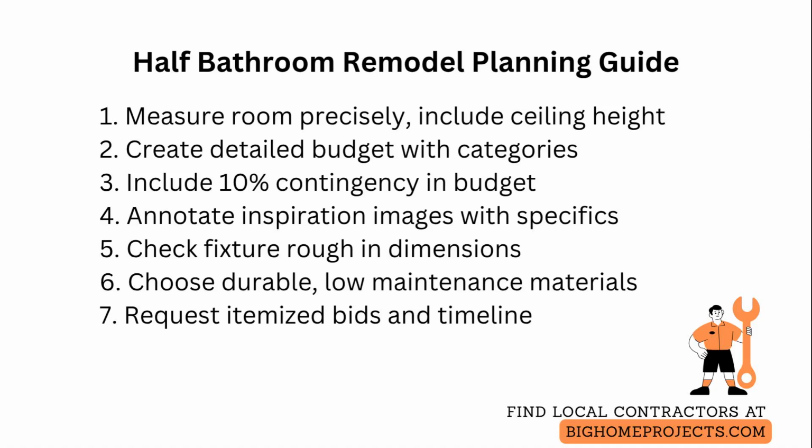Choose materials by lifespan and maintenance rather than just initial cost. For example, porcelain tile and solid surface counters last longer and are easier to maintain than cheaper alternatives. If you will hire contractors, ask for itemized bids and a timeline. Verify where payments fall in the schedule and confirm who will obtain permits and schedule inspections.